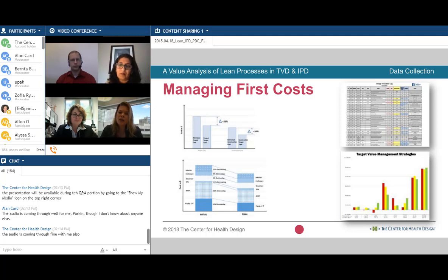And I know you can all read the chart on the right. That is a representation of one of our innovation logs. Every idea, every A3, every crazy idea, every viable idea, any idea that any one of those team members had was added to that list. It was evaluated. It had a deadline. It ultimately had a cost associated with it, and those costs were tallied and placed into the chart you see below.